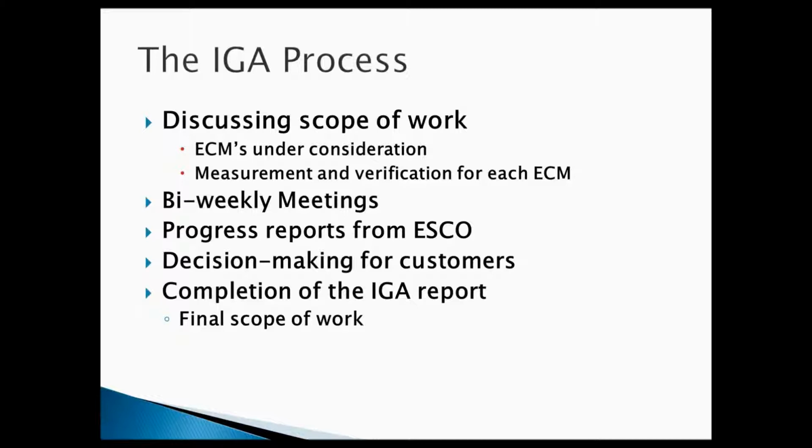When we left off with the last segment, we had completed the selection process for the ESCO, and we were ready to begin the Investment Grade Audit, or the IGA. This is where we engineer and develop the project, and this is the step that establishes the baseline energy usage for your facility that all future energy savings are going to be measured against. It also finalizes the list of the energy conservation measures, or ECMs, that were identified in the RFP. It finalizes the measurement and verification that's going to be used for those measures. Because of this, it's a critical element in the eventual contract that's executed.